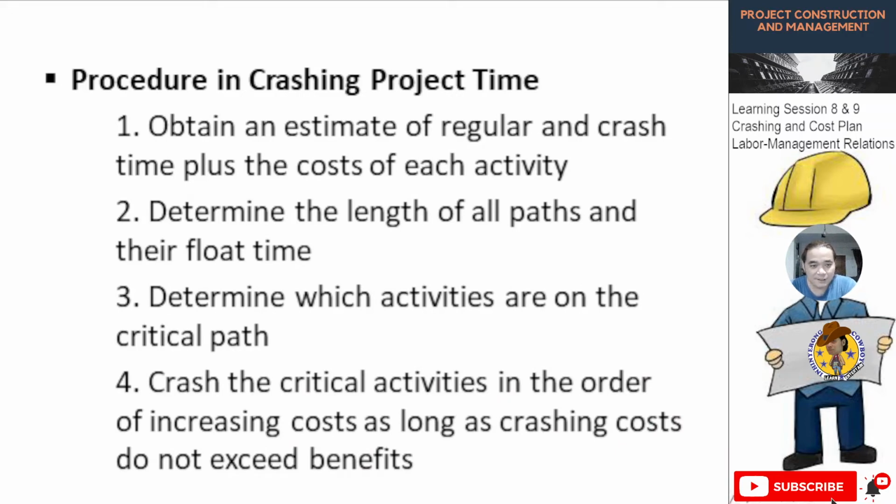Then these are the procedure in crashing project time. We need to follow this procedure to be able to do proper crashing. Number one, obtain an estimate of regular and crash time plus the cost of each activity.